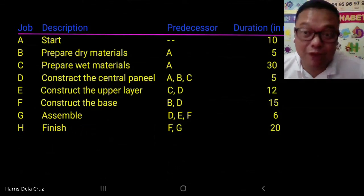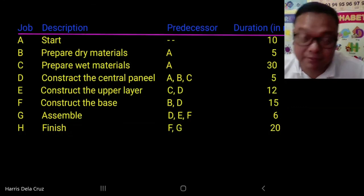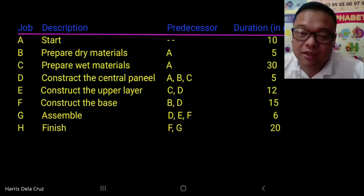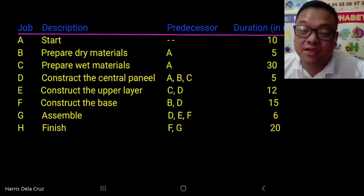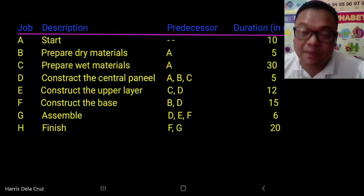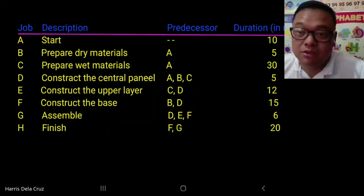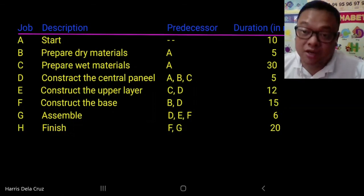What we want is to find the critical path of the project. First, we want to find the shortest possible time to finish the project, find the critical path or the critical jobs, and then find the schedule of each job with the earliest start and earliest finish and latest start and latest finish of each job, so that we may know which jobs are critical and which jobs have slacks.